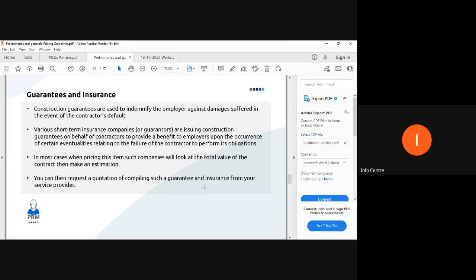The guy said, okay, initially, but I think 2 weeks later, they came back saying that, no, maybe it's because of the design. We said it's got nothing to do with the design. This is a natural disaster of which you were meant to be protected against. It's outlined under the general conditions of contract, which is the GCC that we were using. And we quoted all the subsequent clauses that supported our statement. And we told them, please claim from your insurance and redo the work, because we've budgeted for such conditions. Now, think about it.